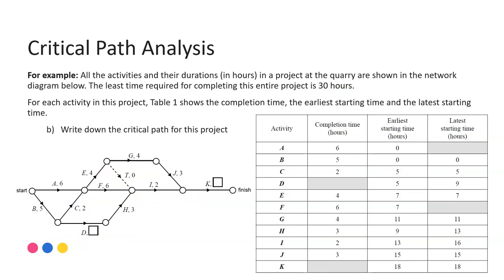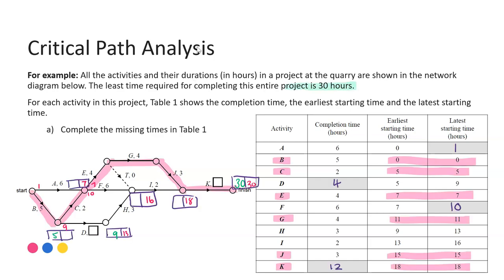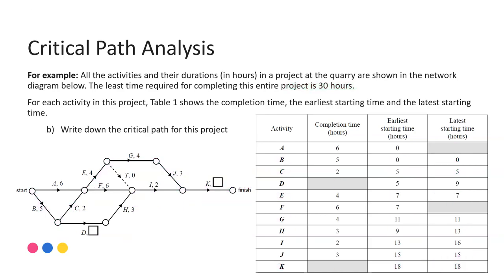Finally, it's asking us to write down the critical path for the project. Going back to our previous findings, the critical path is any activity where the earliest and latest start times are equal - no float time. Running through that sequence: B, C, E, G, J, and K. So writing that down: B, C, E, G, J, K.